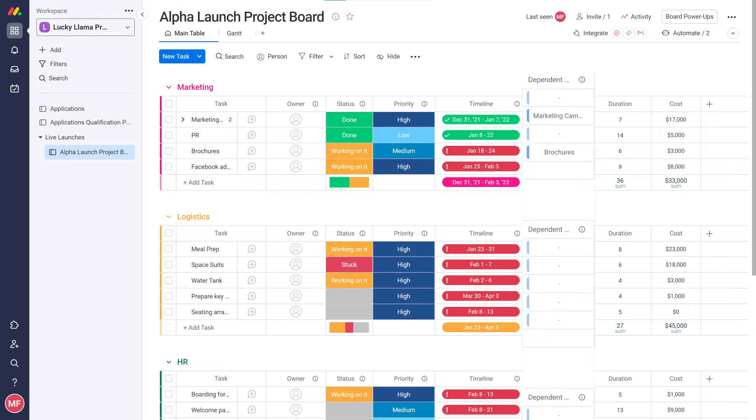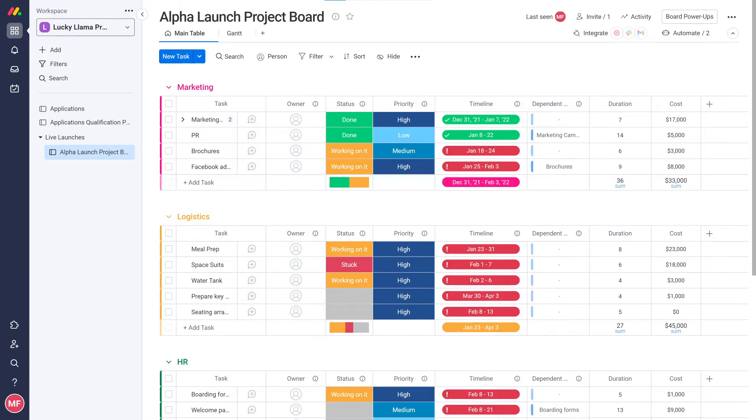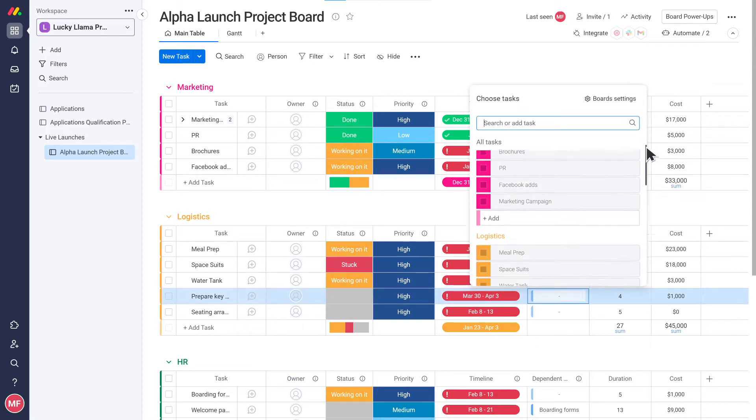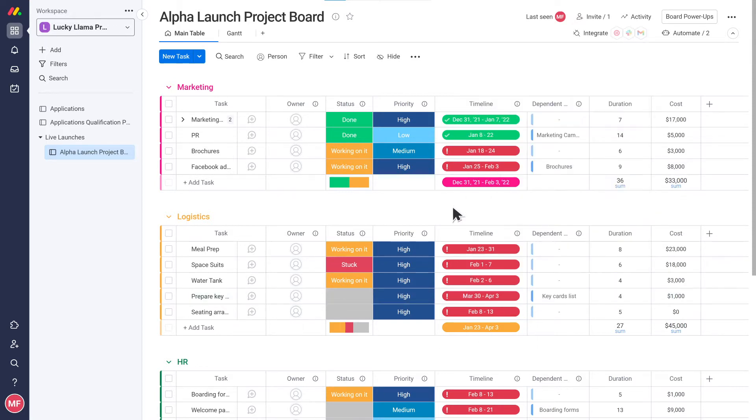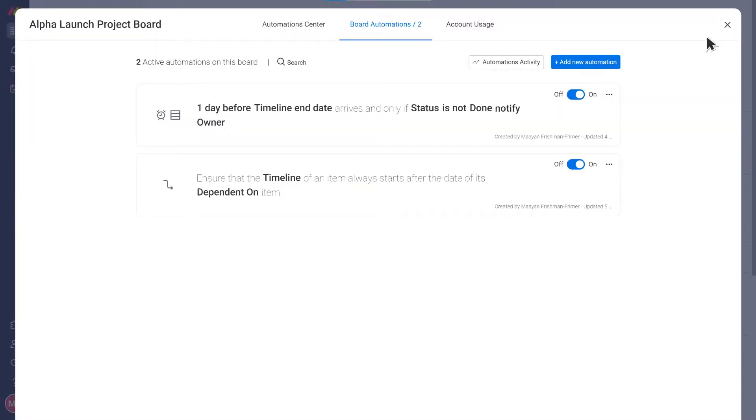First, I want to set the dependencies between the tasks which are dependent on another task. For example, I can't prepare the key cards until I've finalized the key card list. Once you have set the dependencies in the dependency column, we can add automations to make sure the timelines stay intact if anything changes.